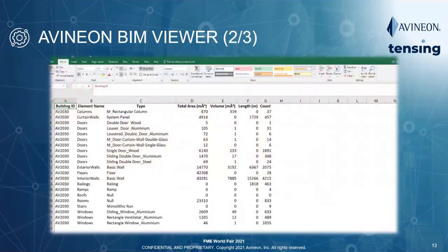This is a great example of the bill of quantities I mentioned earlier. So that's a document that provides specific measured quantities of the different building elements. And here you can pick on a particular building, a particular floor, particular area of a floor, and have it give you all of the elements and object types associated with that area. And this is all done through the web application.